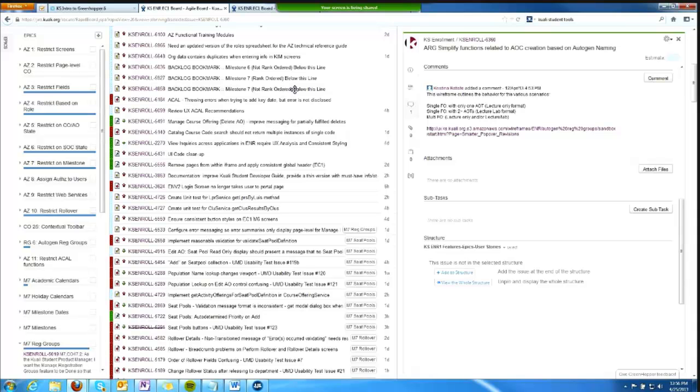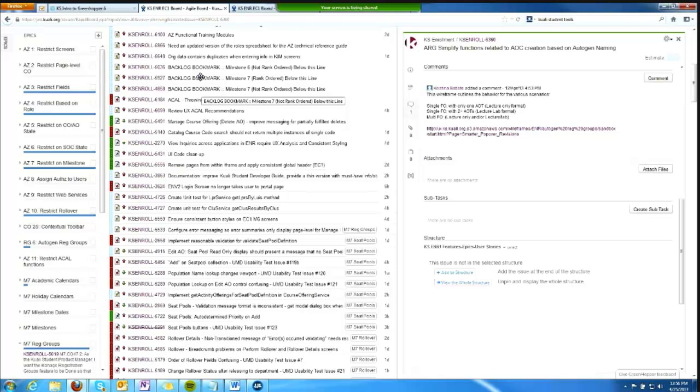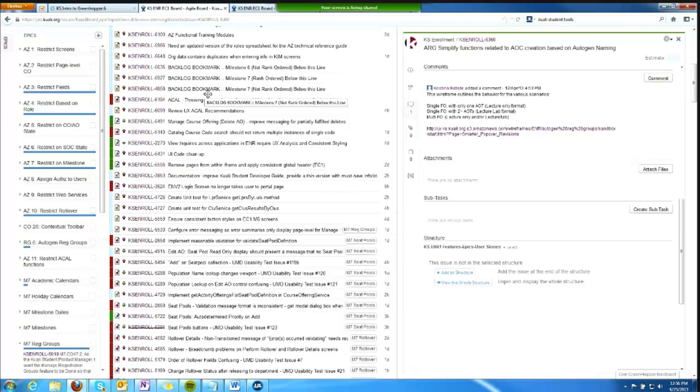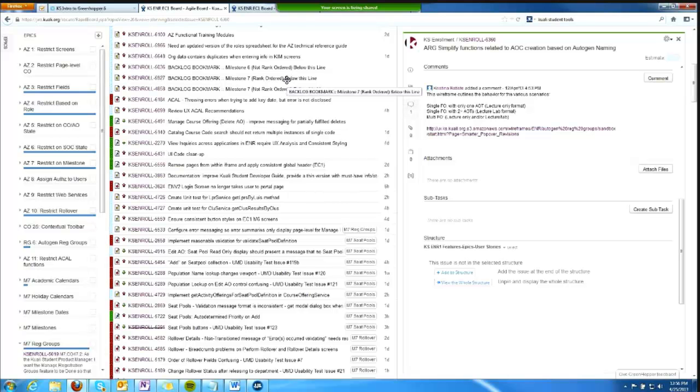I need to fix this. This got thrown off a bit this morning, but the product owners and I establish the rank-ordering of tickets within milestones. As new tickets arise, we put them in this not rank-ordered place and then integrate them into the rank-ordered part of the backlog.